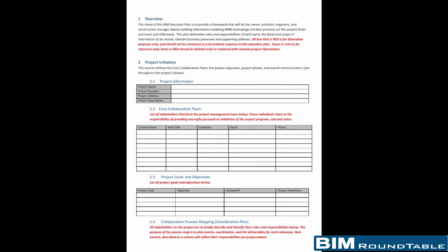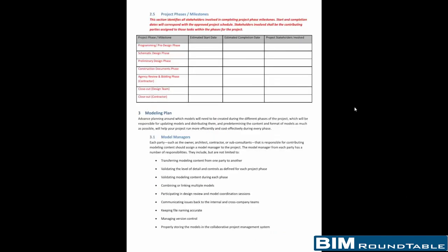Then there's the coordination plan here, where by phase, I think we kind of did this in our note cards a little bit, like who was doing what by phase. That kind of gets filled out in this template as well. These milestone dates are all our best guess, and this is determined by our process at first. When we put out the RFP for this project, we had a schedule in mind that we could tell the teams what that schedule is in terms of the end date.